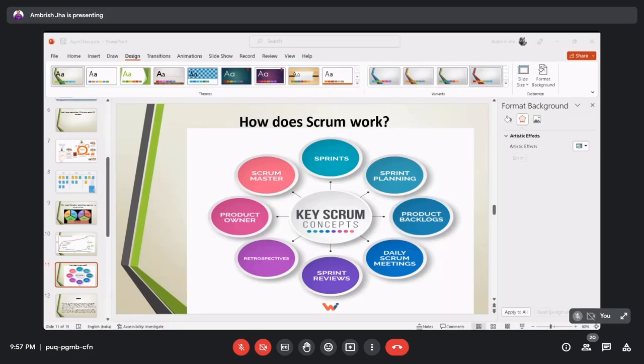At the end of the sprint, when we are closing the sprint, we can see how many tasks we have completed successfully and how many are spillover. Spillover means we could not complete them in this sprint for a certain reason, and the task will be moved forward to the next sprint.